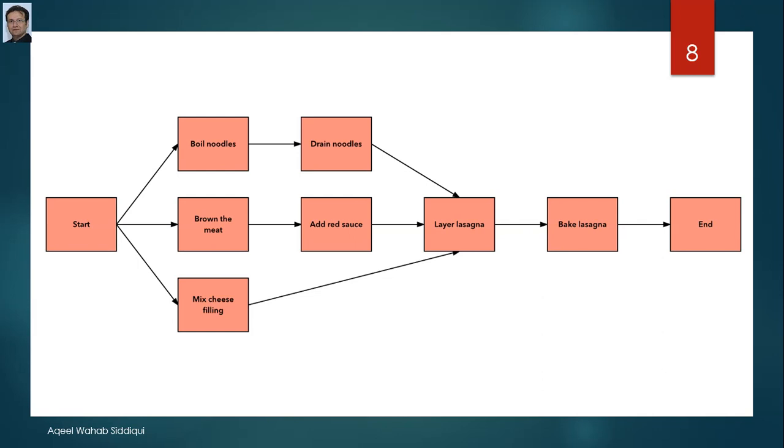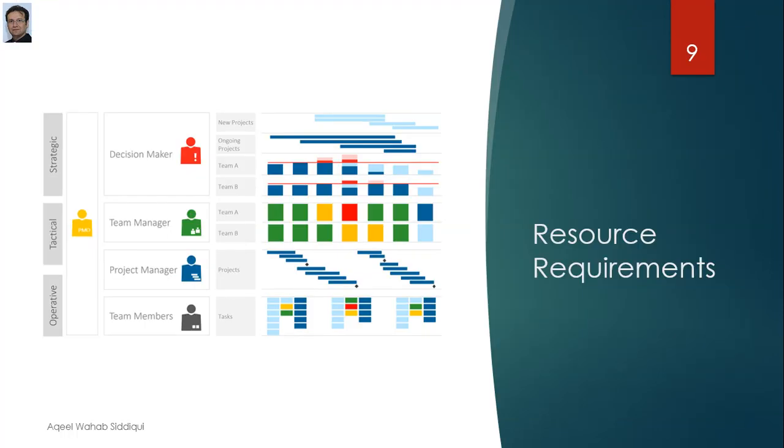This is an example of a network diagram. When we take our work breakdown structure, we further decompose our work packages into more manageable components in the define activities process, where we produce defined activities, and then sequence activities. We also work on compiling the milestone document. We take our activities and sequence them, and once we sequence our activities, we draw this network diagram. Based on the network diagram, in the resource management section, we assign resources, human resource, material resource, cost resource, to the different activities in the network diagram.